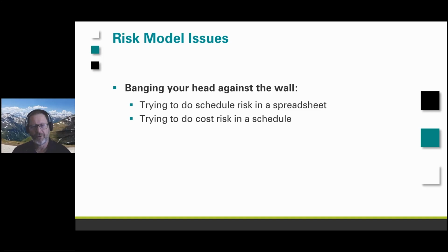Finally, don't bang your head against the wall. Don't try and do schedule risk in a spreadsheet. Don't try and do cost risk using a resource loaded schedule. Okay, both of those are just a whole lot of work. You can do it. People have proven that you can do it, but it's a lot of work and it's just not worth the effort.